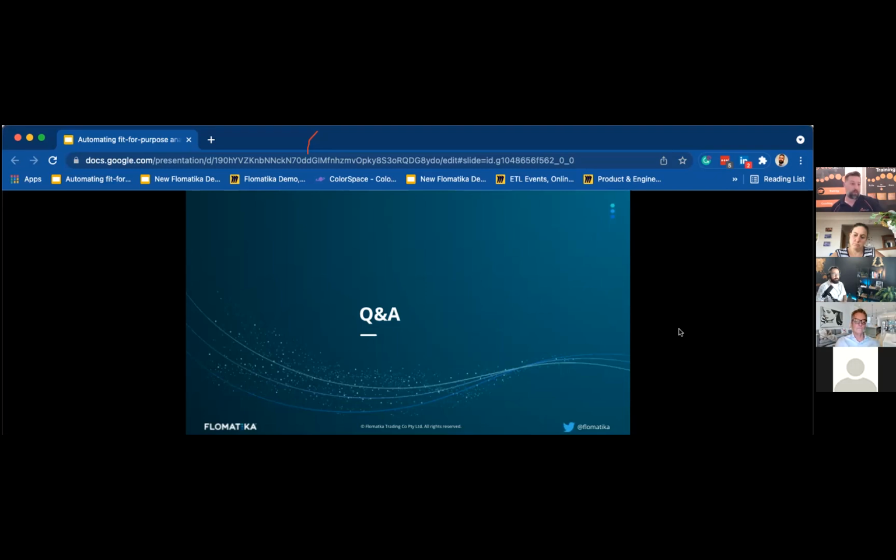Perhaps I can add just a particular example for Jay there. One example we've seen is a team looks at their lead time and says, okay, how do we reduce our lead time? So they can do analysis, see what's our longest queue. And it might be, let's say, ready for release, spending 20% of your time waiting for release. Why is that? Because it goes to a queue for the release team to release. What if we automate that? We could potentially save 20% of our lead time. So that's probably one example I can share with Jay.